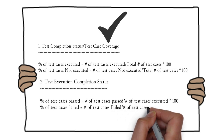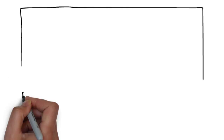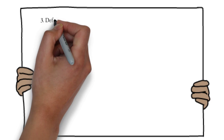The second calculated metric is test execution completion status, which gives information about the status of executed test cases. The pass percentage is found using: (number of test cases passed / number of test cases executed) × 100. Similarly, we can find the fail and blocked percentages using the same approach.